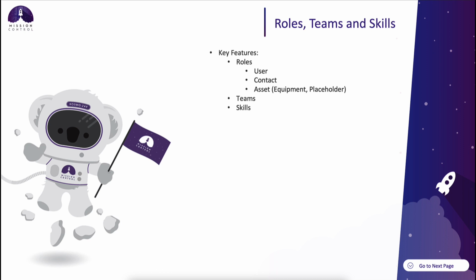The other scenario is when you're assigning placeholder roles. When you're creating your project templates, you don't want to assign a live resource on your templates because their availability might differ. In that case, you want to assign a placeholder role. A placeholder role defines the type of resource required to fulfill a task or an action. So for example, you've got a task that requires a project manager or maybe a consultant. You can create a placeholder role accordingly and then assign that on the template.